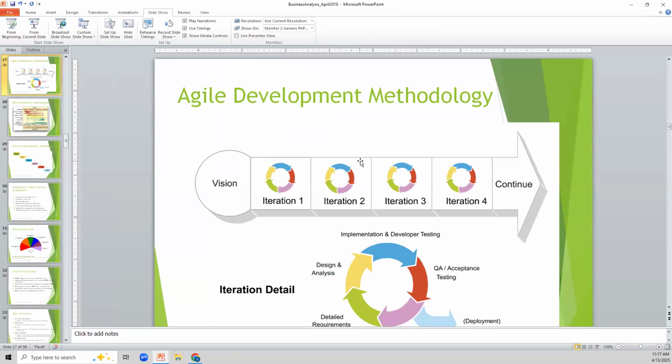For something like a PHN nurse system, definitely in 2 weeks you won't be able to build a system that your nurses can start using. So you may have to say, it's okay, I'm going to take 3 iterations to build an MVP. In the first iteration, I'm going to do this functionality. Second iteration, I'm going to do this. In the third iteration, I will do this. Now there is a minimum set of functionalities that nurses can start using.